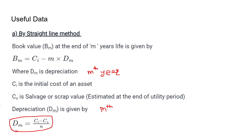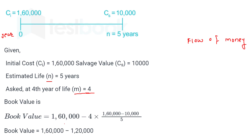Putting the values into the straight line method formula: BV_4 = 160,000 − 4 × (160,000 − 10,000) / 5. This gives the depreciation over four years, and our book value at the fourth year comes out to be 40,000 rupees.